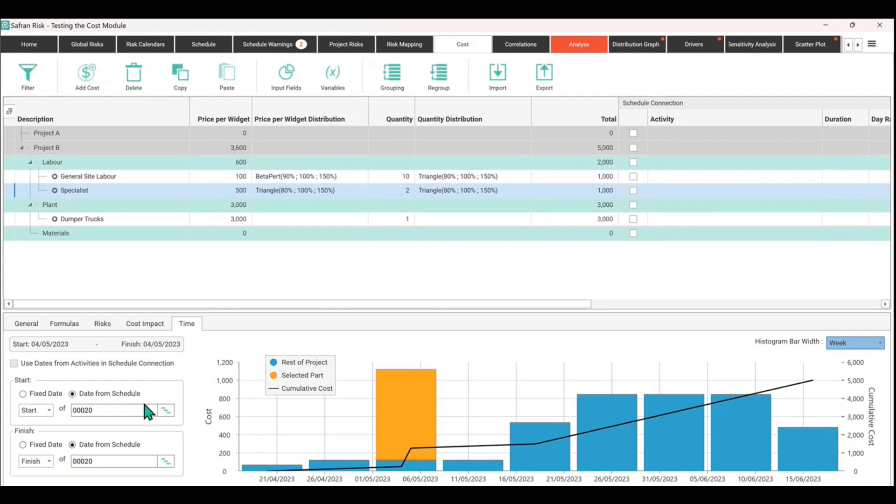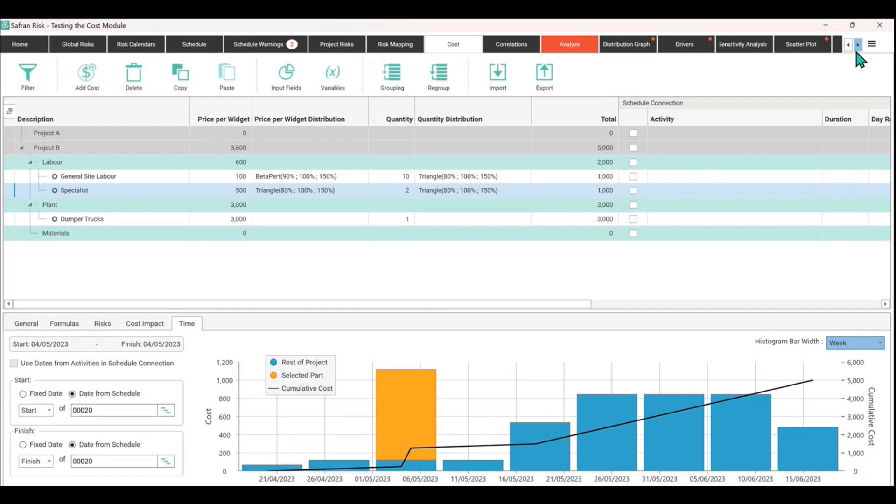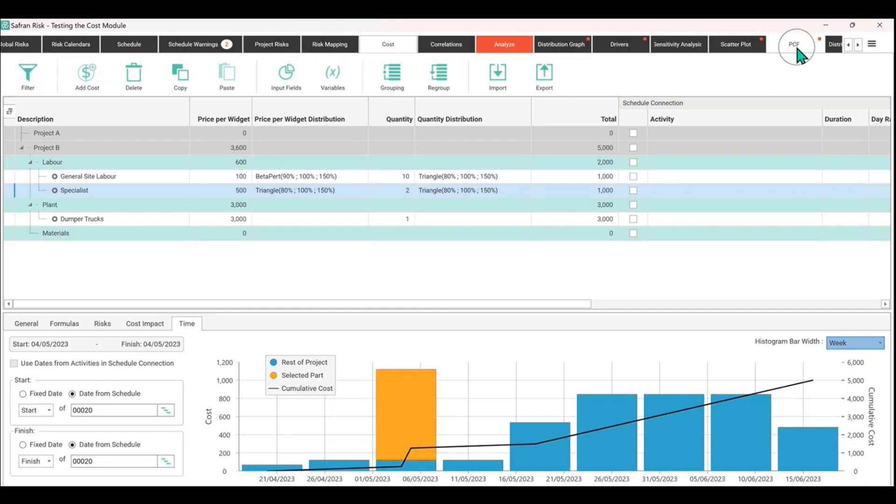That is one way of building up your cost model and then linking it in time to something that's happening on your schedule. And then of course you could start adding uncertainty to this schedule, and then these things would move in time.